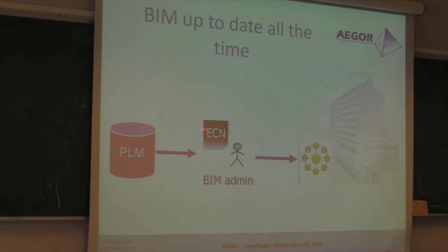And this is just available. A BIM administrator is easy to design, and he gets this moving baseline, and on the effectivity dates, he can just add and subtract and delete pieces of BIM models, and the result is an always up-to-date BIM model. This can be done. Now this afternoon is a little bit late, but tomorrow you can do this. So you can just go on.